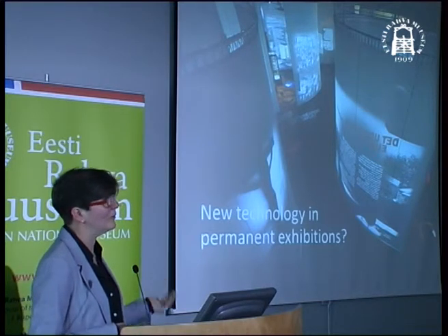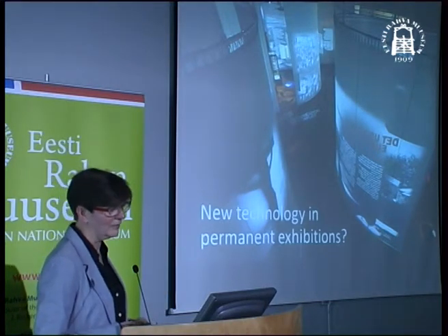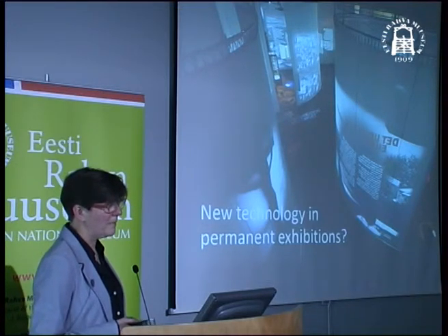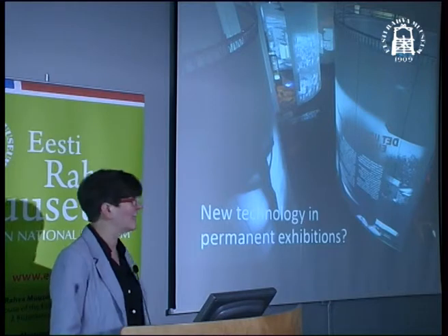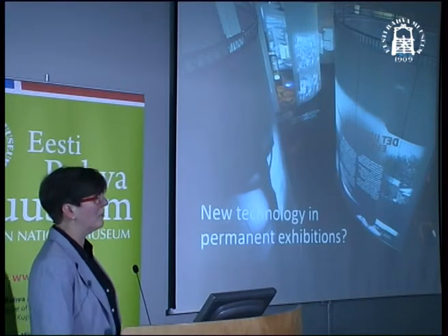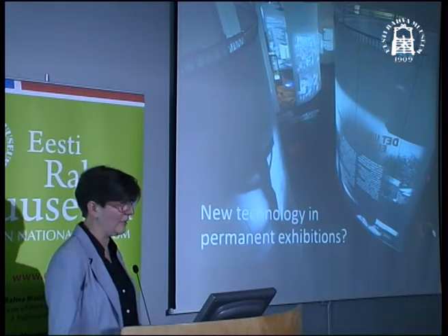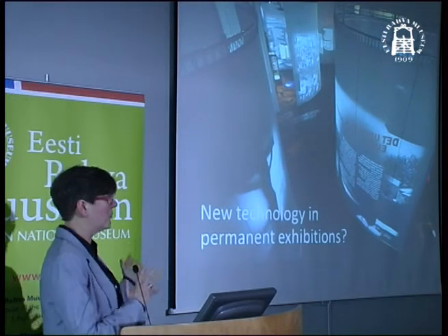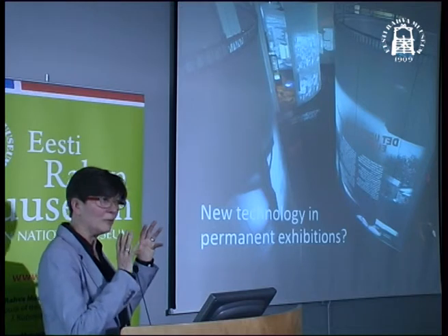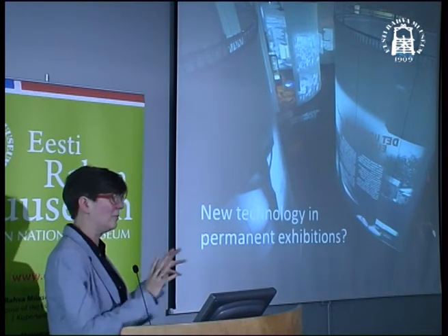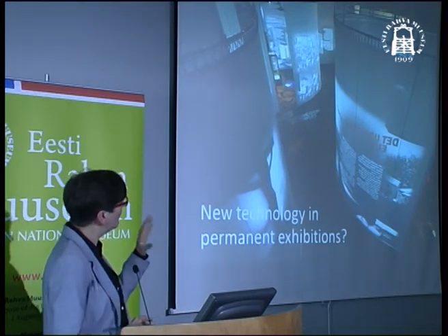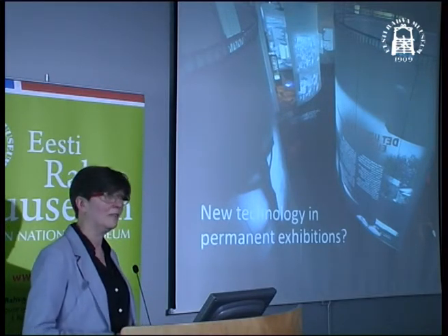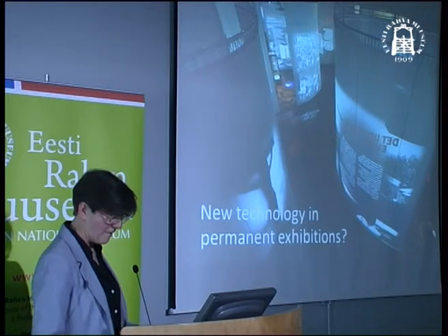How long can all these projectors exist? And so on. I know some museums, like the Historical Museum in Berlin, I think they change a part of the museum every year. So they have in their budget that you change a certain part every year. So I think one has to have that in the permanent exhibition later on as well.